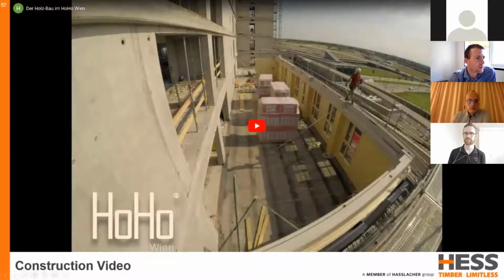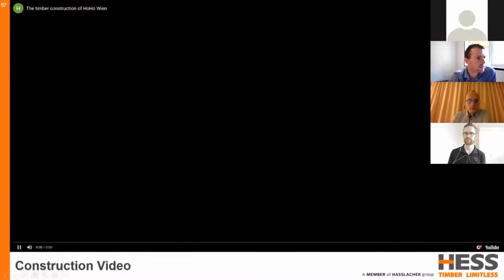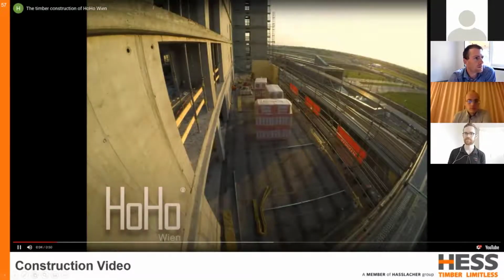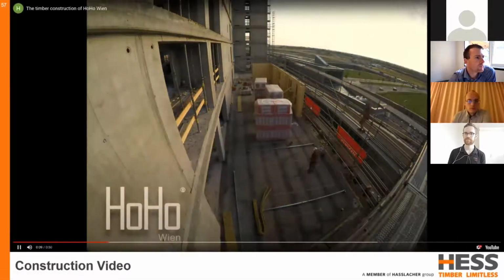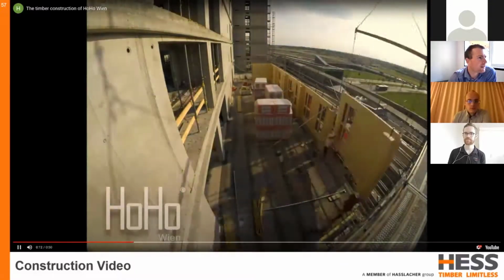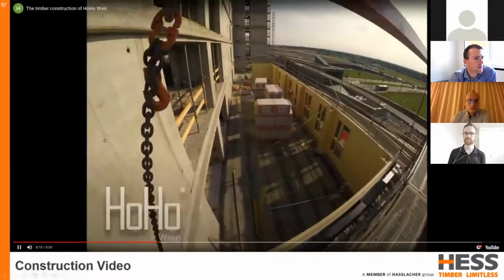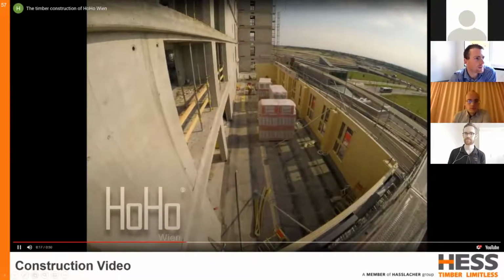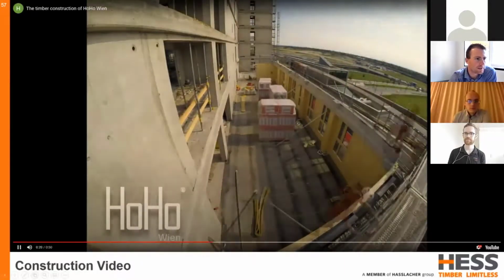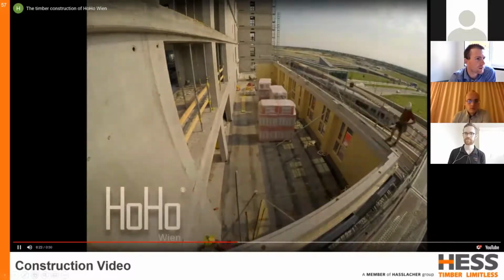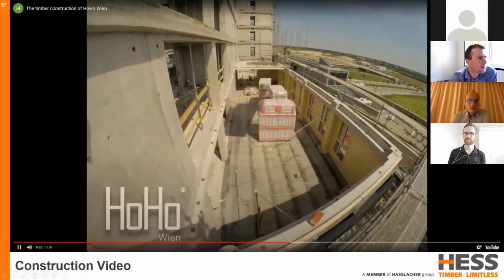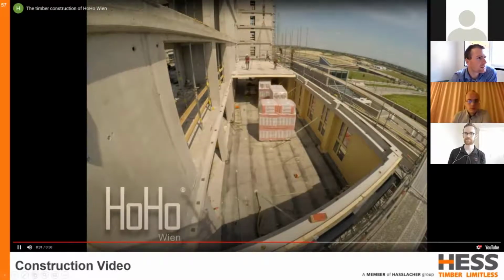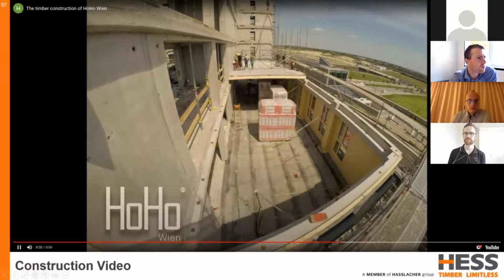Here's another video of the installation, which I'll explain. You can see here the individual wall panels coming in. I don't know exactly the timing around here, but you can get a feel for how quick this was installed. I estimate that they're lifting in segments every 5 to 10 minutes and building an entire floor very, very quickly. You can see this guy here applying neoprene strips to the precast and the composite floors going in.